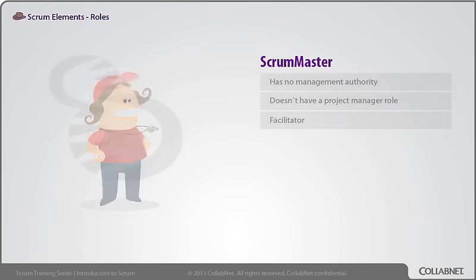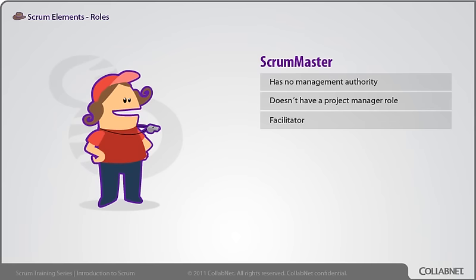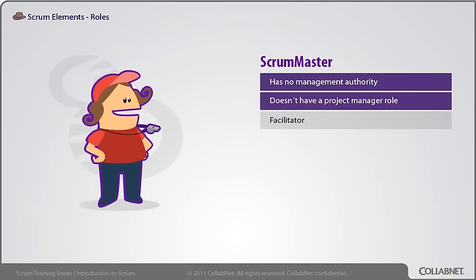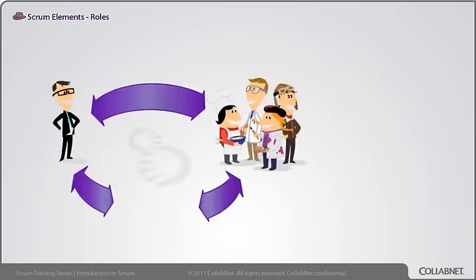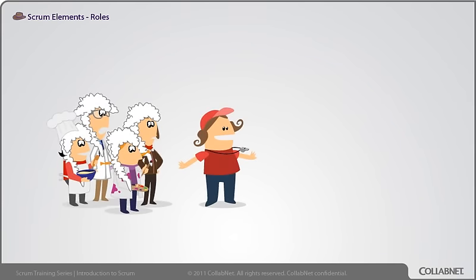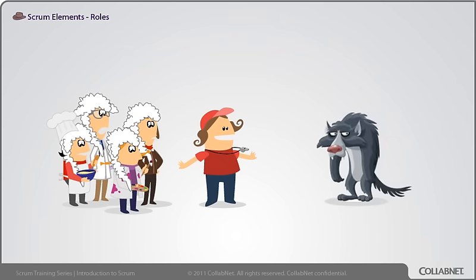The Scrum Master is the most misunderstood role in Scrum. The Scrum Master has no management authority over the team. If you're the project manager or line manager of the team, by definition you are not the Scrum Master. Scrum intentionally leaves out the project manager role — those responsibilities are split among the product owner and the team, with the Scrum Master acting as a facilitator. The Scrum Master protects the team from distractions, removes impediments, facilitates the process, teaches people how to use Scrum, promotes improved engineering practices, enforces time boxes, and provides visibility — all without any management power.